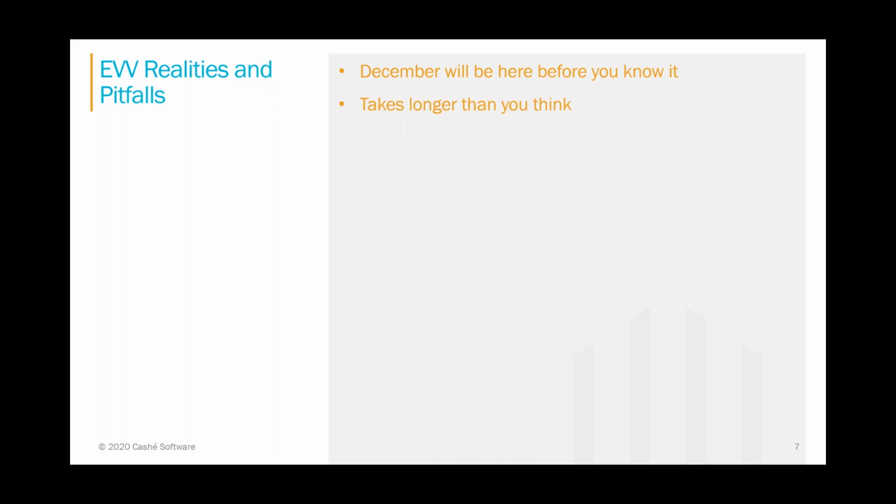What we've experienced is it takes longer than you think. We've had customers who started and then restarted because they learned something about the way we do implementations that's better, or the implementations may have stalled and they had to restart it because they didn't realize how much effort it took. So understand that it always takes longer than you think. This is not a sprint. This is a marathon. The slow and steady wins the EVV race. Plan to start small, do a pilot, and then roll it out slowly. And eventually, by the time December is here, you'll have a much better experience.